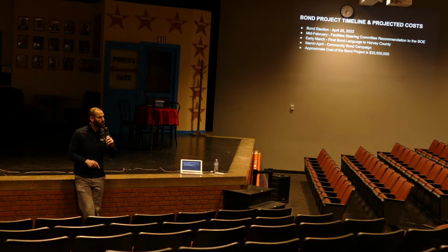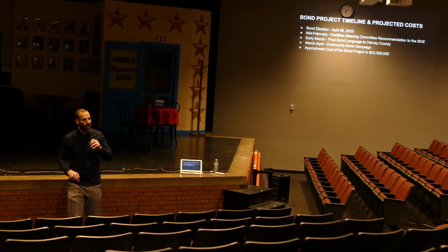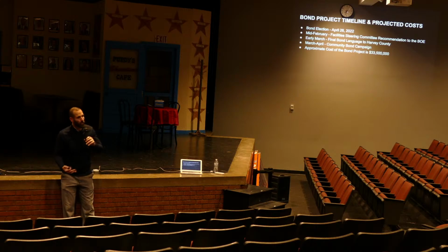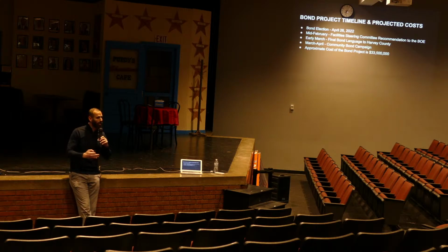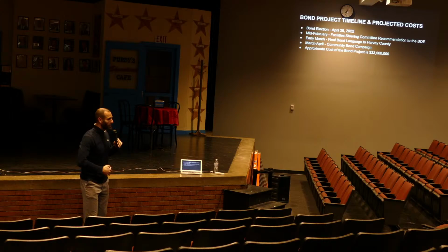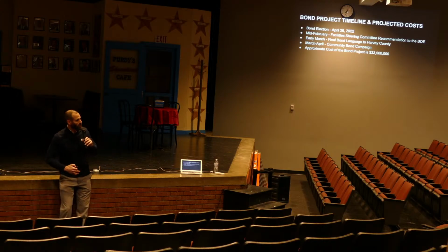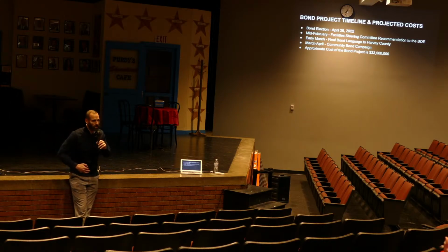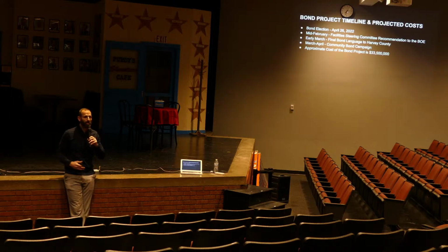We probably won't do that at the regular meeting on the 14th. It'll probably happen at a special meeting that we'll schedule for either later that week or the following week, but we'll have that committee come to the board meeting and make a recommendation for the board to consider. At that point, the board can say, we're ready to move forward, and then we would submit that bond language to the county, and we want to do that by early March so they can get ballots printed, all those types of things. The board has a lot of flexibility. They can decide that they want to do something different than what's recommended by the committee. They could decide we're going to pull the whole thing off.